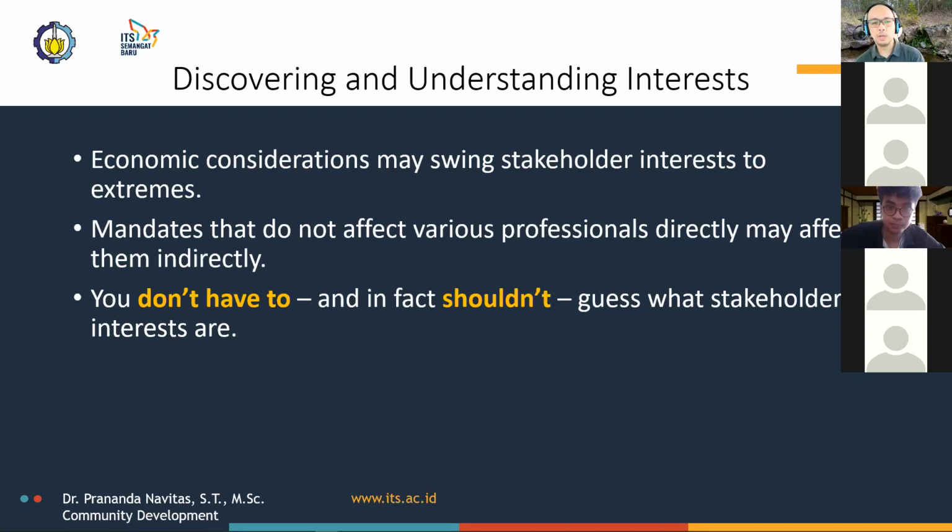And lastly, you don't have to, and in fact, you shouldn't try to guess what stakeholders' interests are. You should ask your stakeholders what's important to them. If there are stakeholders that aren't willing to be involved, try to talk to them anyway. If that's not possible, try to find out their concerns from others who are likely to know.